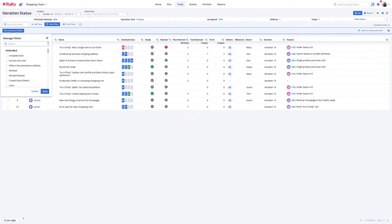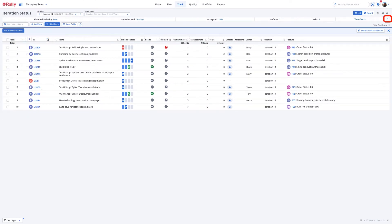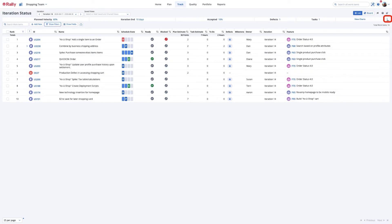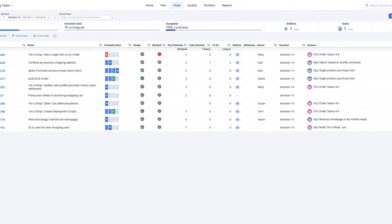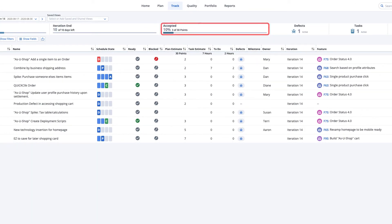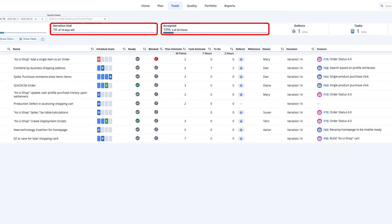Expand the Stats banner to view important data points about the iteration's progress. Compare the percentage of accepted story points against the number of days remaining in the iteration to predict if the team will meet their commitments.